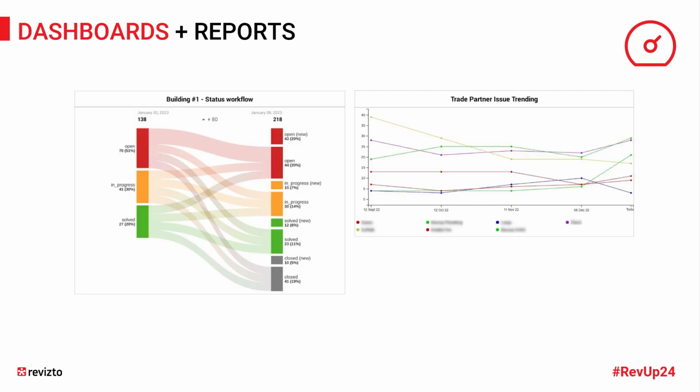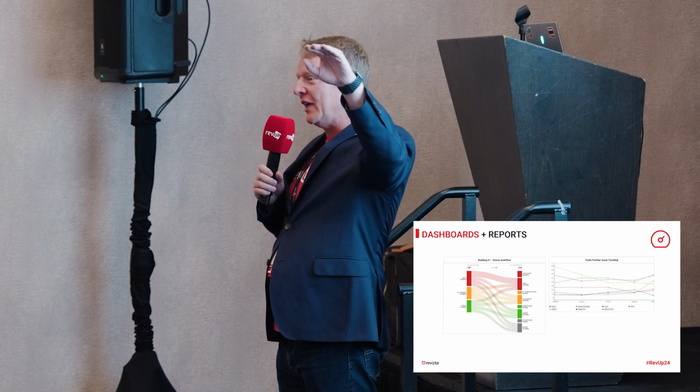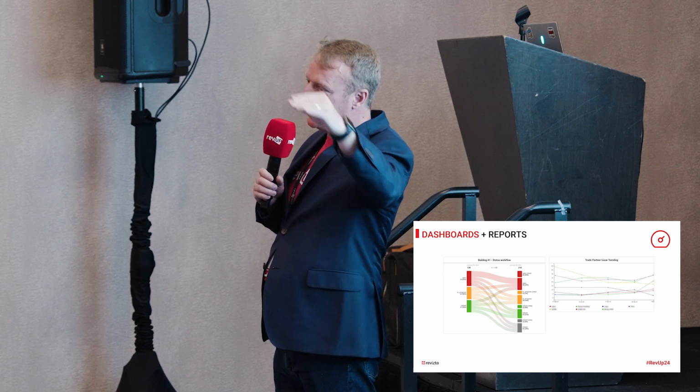Just before you skip, I particularly like the timeline chart. And how many people are using the timeline chart? Oh, that's really good. That was my favorite one. I used to have conversations with project managers that in the beginning of the project, we expect the line going up. In the middle of the project, we expect the line to flatten off. And towards the end of the project, we expect the line to go down.